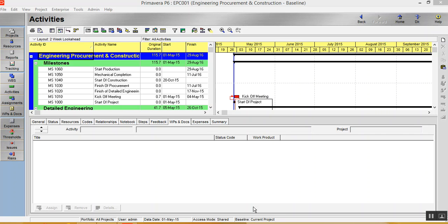So first of all, what I do is I have to ensure that the project is having a baseline. Now I already defined the baseline for this project. You can check it over here. Baseline is the current project.